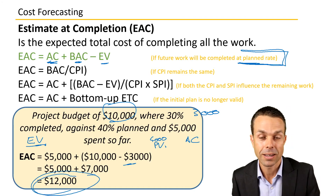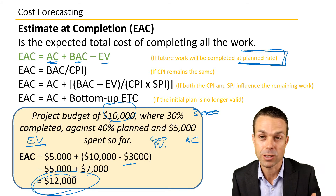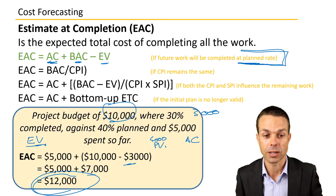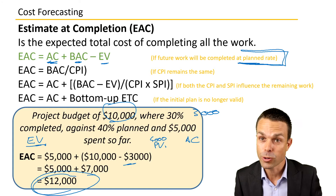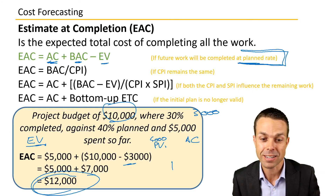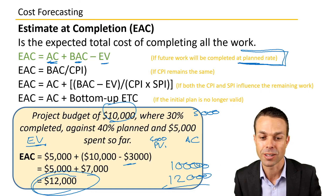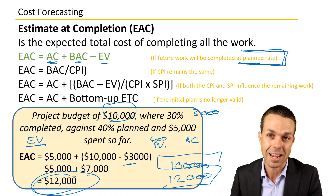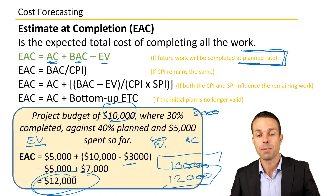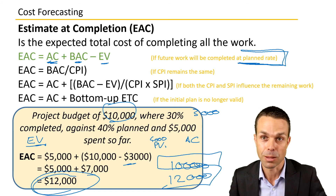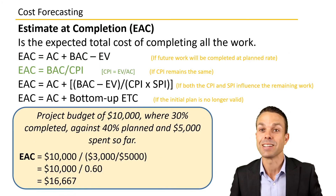That's what we're expecting to pay to complete this project — the estimate at completion, the total amount at completion. Notice that it's different from our original budget: we'd planned $10,000 but now it's going to be $12,000. So we're going to have to adjust — do a change request, get more money, or perhaps use management reserves. Let's look at the next formula: BAC divided by CPI.